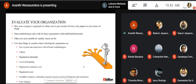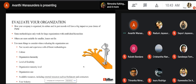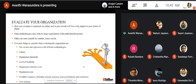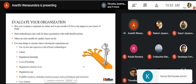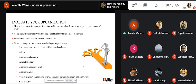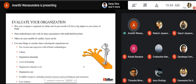The third step is to evaluate your organization. How your company is organized, its culture, and its past records will have a big impact on your choice of project management methodology. Some methodologies only work for large organizations with established hierarchies, while others are more suitable for smaller, leaner outfits. For instance, if your past records show that all your agile projects have been delayed and poorly received, it's best to avoid agile in the future. Look at your past records and see which methodology has worked best — whether agile, waterfall, or a hybrid model.